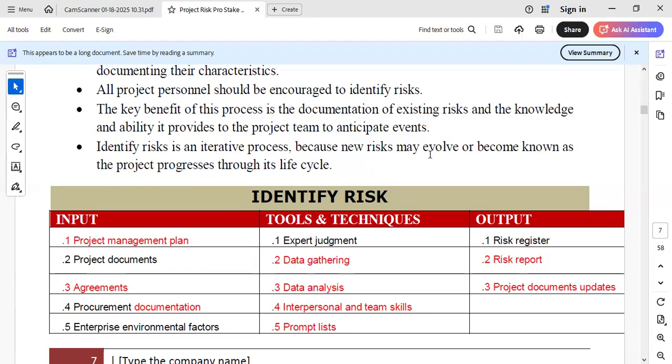We did not tell them that the filling should start from bottom to top. So they just sealed up the top. And they were right because they were smart. It could have cost them more materials to fill up the hole from bottom to the top. So as we initiated management of change, as we requested a change, they analyzed and told us how much it would cost us.